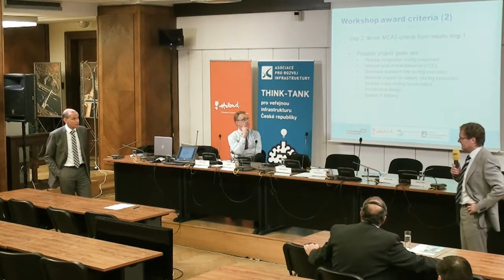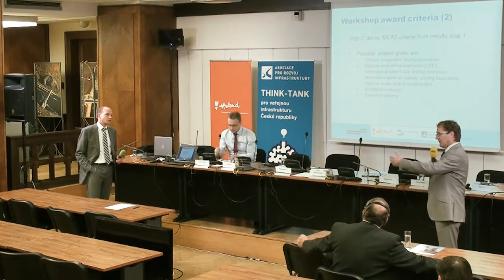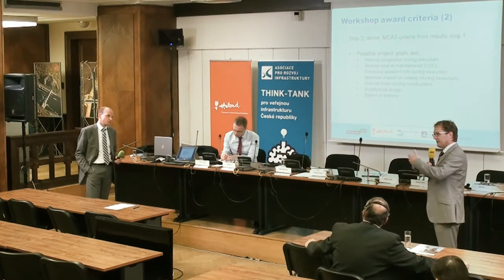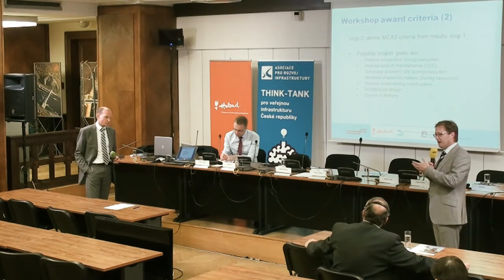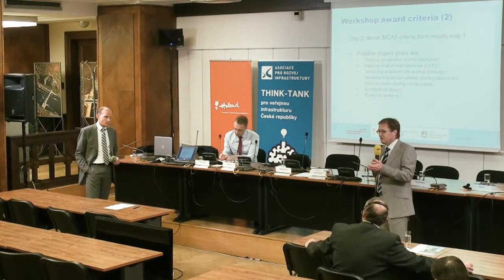Yeah, because you always have to think about, okay, I am the client, I put up all these specifications and what I want on meet criteria, but you also have to think about how they are going to be discriminating when I give this to 5 bidders, because they have to be discriminating. If they're not, well, then this meet criteria doesn't have any influence. So that's what you're saying on LCC, for instance.